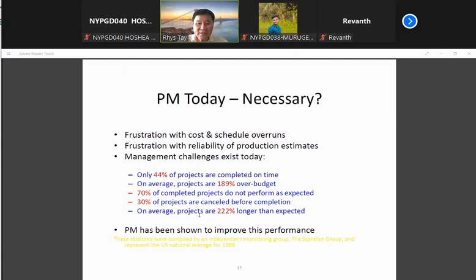Right? Third thing is your supply chain management. If your ordering of raw material, your material to back up your project work, doesn't come on time as per your schedule, that means the project will be delayed. Okay. Fourth, it could be your financial problem, the cash flow problem of the company. They do not have enough money to pay for more raw material supply and also the workers. They don't turn up, then there is a delay in the project.